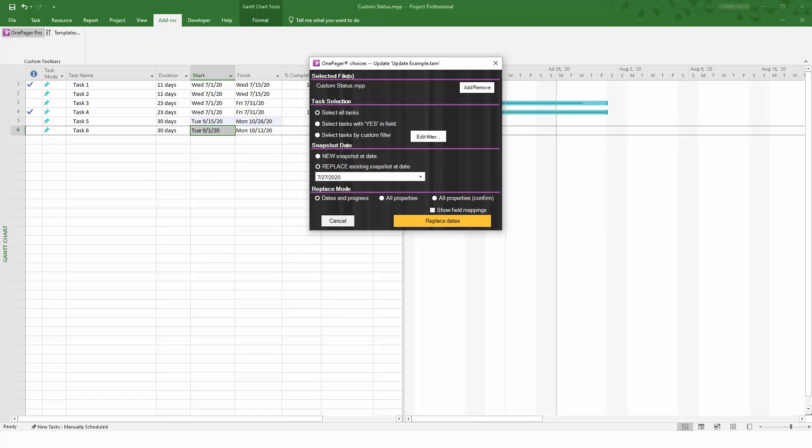On the other hand, the All Properties option will perform a full refresh, including things that don't change very often, like your task names, swim lane groupings, and WBS outline levels.